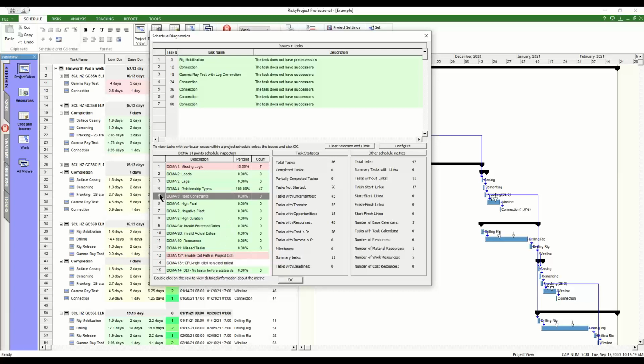And the last one is hard constraints, and we do see these a lot. The only hard constraints that sort of get a pass are when you have actuals. Once that activity started, if you're in the middle of a project and it started, those actuals are hard, we can't move those. That's not part of the simulation. So you'll see those sometimes.